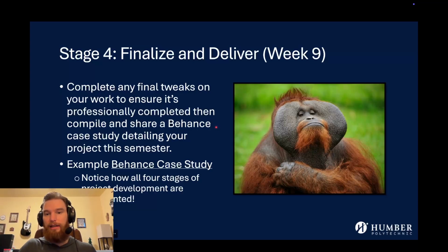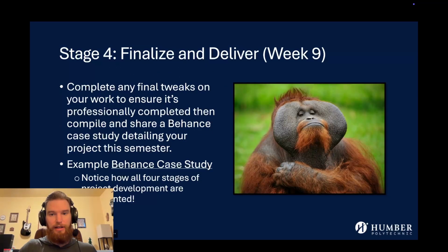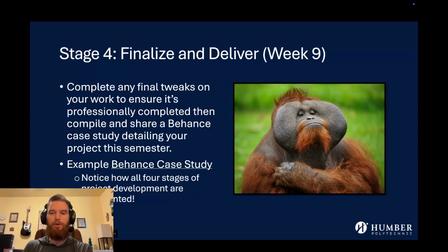And yes, you're given at least 1 week of dedicated time to do that, but I think a lot of students weren't fully completed with their production stage by the time the case study came around. So they were trying to both finish their production work and make the case study at the same time, which was quite overwhelming. So that's why it's very important for you to be completing these stages at the desired timeline, at the desired plan, to ensure that when it comes time for stage 4, you aren't still doing significant production work and you can instead focus on that case study.